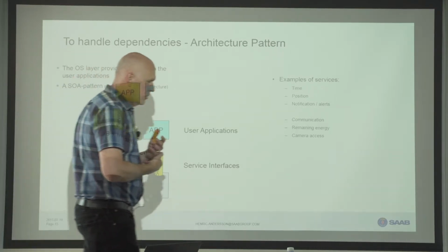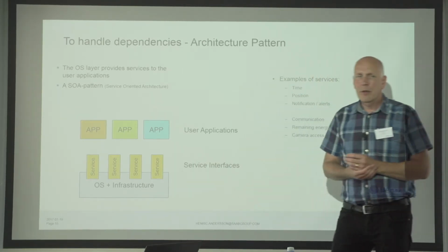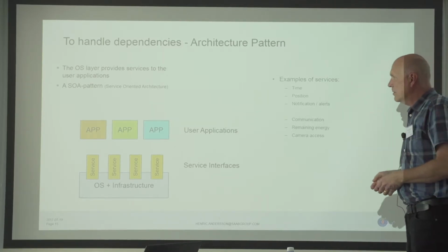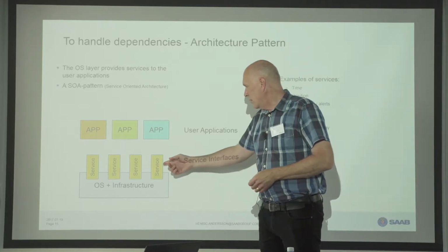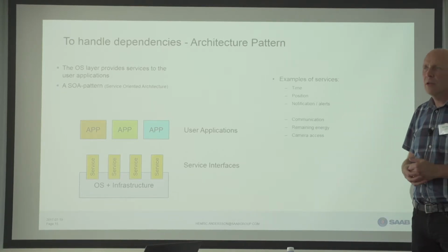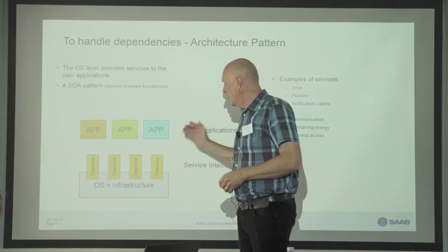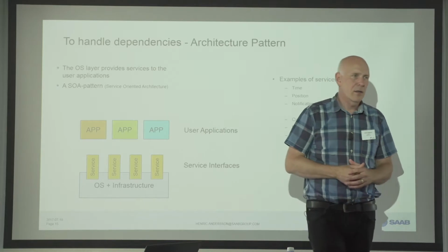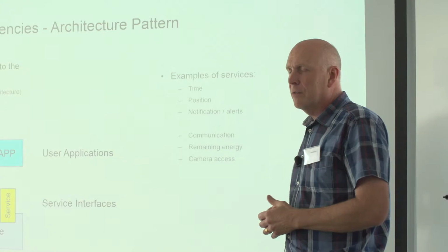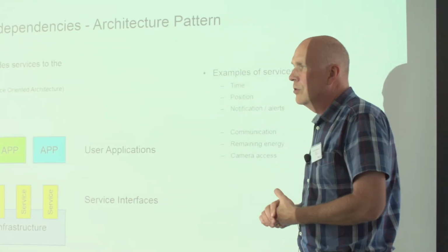Yeah, and if you have an interface that is used by very many, we call that a service because it serves very many applications. So the service interfaces should be planned in very early and be very stable, so you don't have to change them, because changing a service affects a lot of applications. It's very expensive, and in the aircraft industry we have to verify and test everything over again. It's very expensive to change the interfaces. So here we really have to do a good job early in the program.